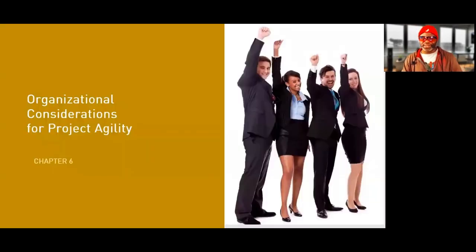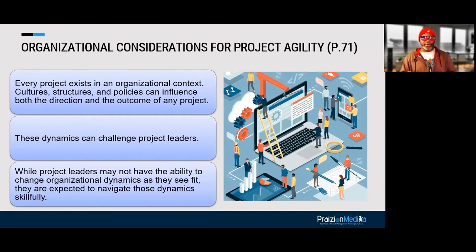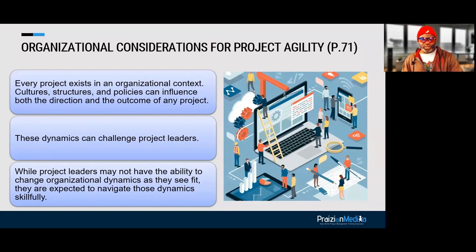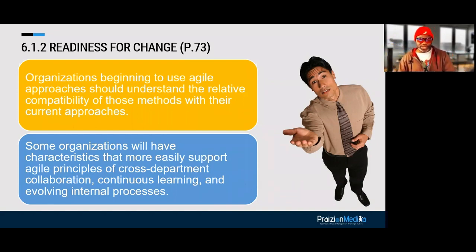Chapter six is organizational considerations for project agility. In the world of Agile, PMOs do exist but they are not draconian — PMOs invite people to a conversation if there's interest. Every project exists in an organizational context; culture, structures, and policies can influence both direction and outcome. If you wanted to introduce Agile to a firm, start with training, coaching at a higher level, use these concepts so management can embrace them, then teach people these practices.